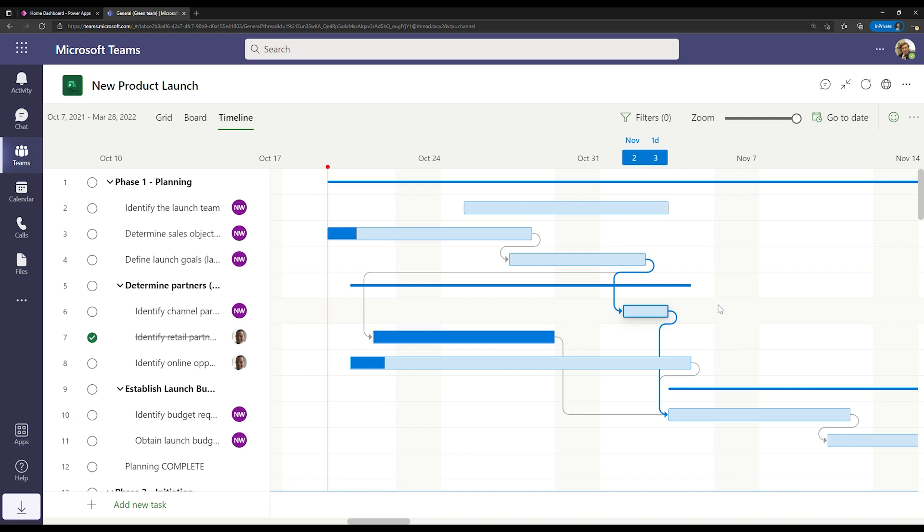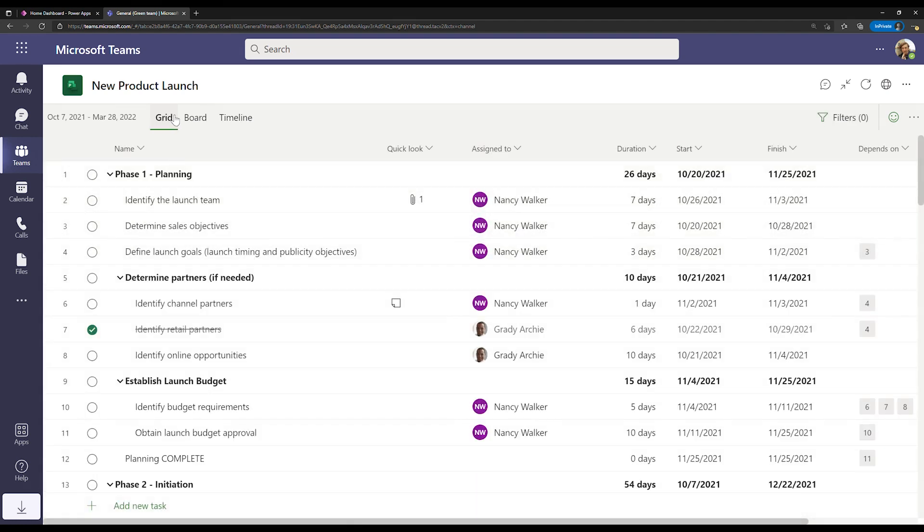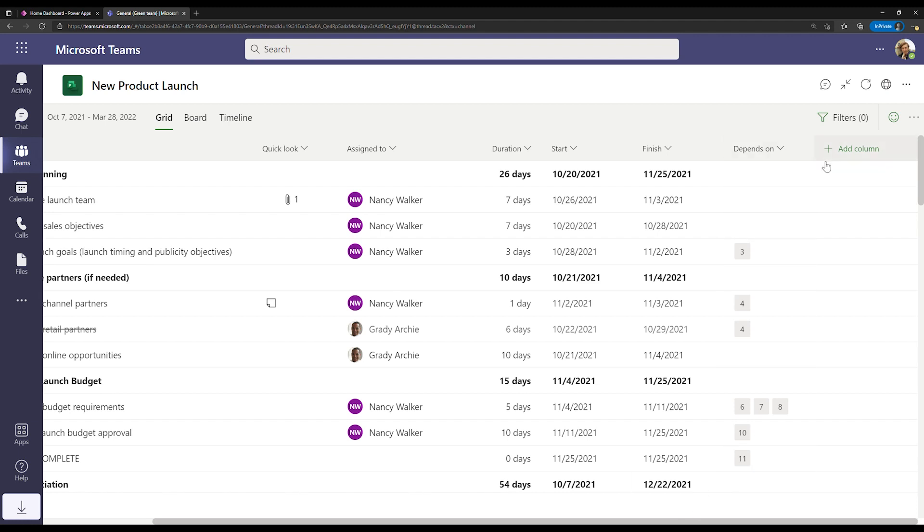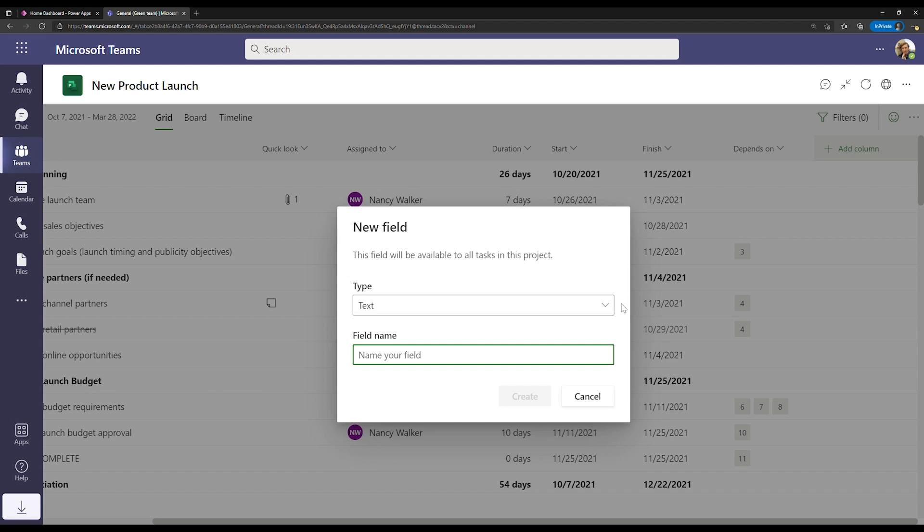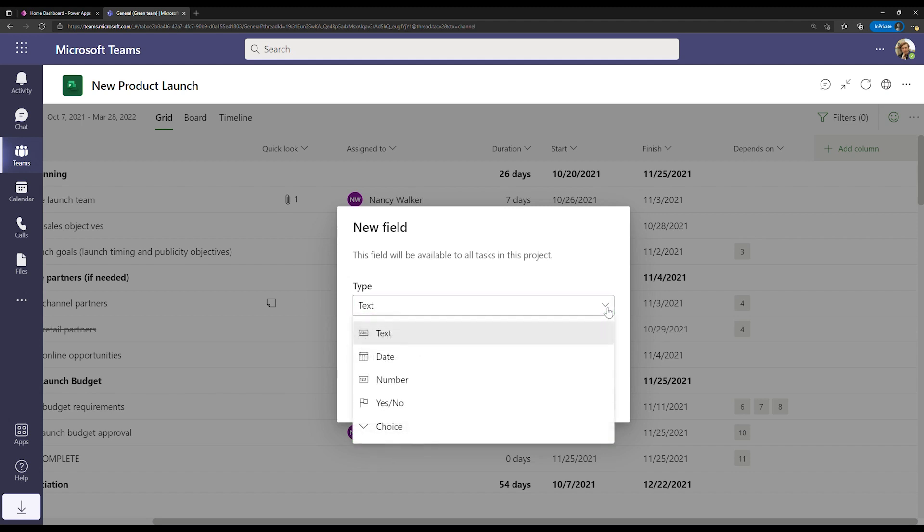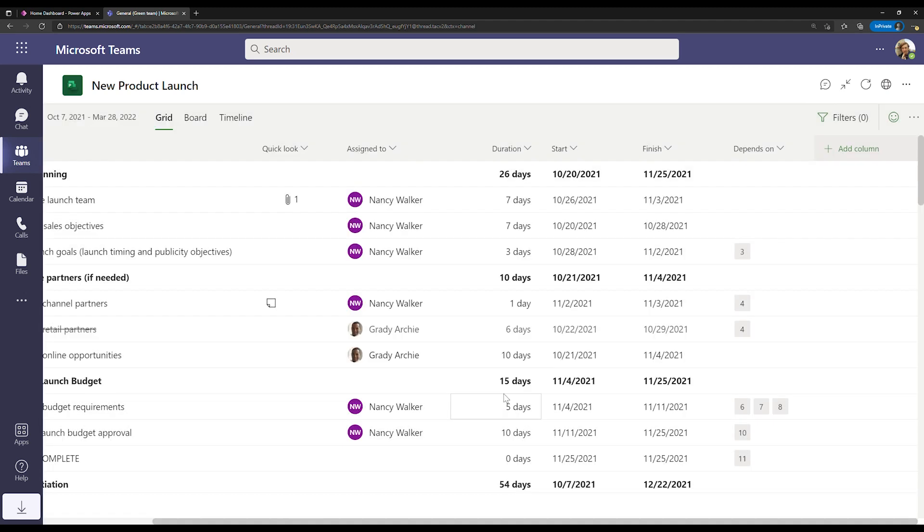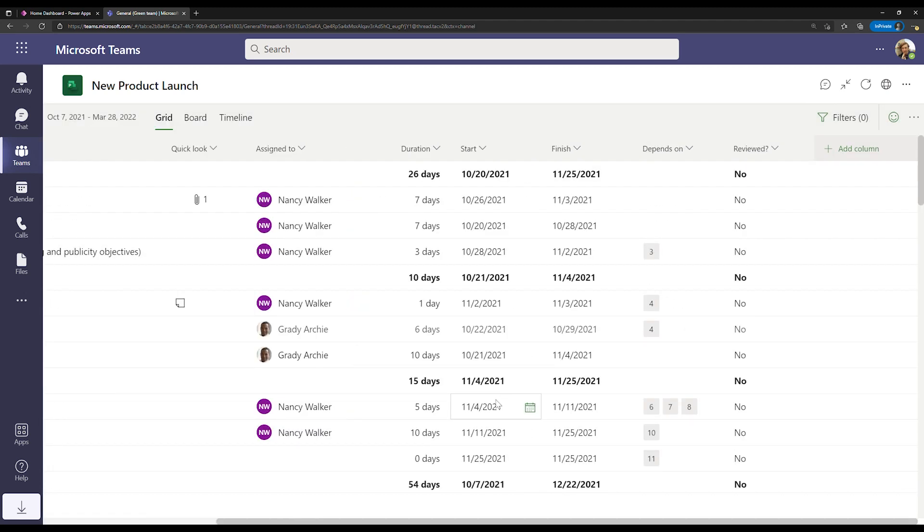Now Project also allows you to customize your tasks to store additional information. Let's go back to grid view for a second. Here you can see that I have a bunch of columns by default, but I can scroll over and add an additional column. Here I'm going to choose to select a new field. And once I'm in this new field, I have a bunch of choices for the type of information that I want to track across all of my tasks. Once I go and create a field here, let's say whether or not a task has been reviewed, it'll automatically get created and added to all of my tasks. So I can update it for every single thing in my project in a customized way.